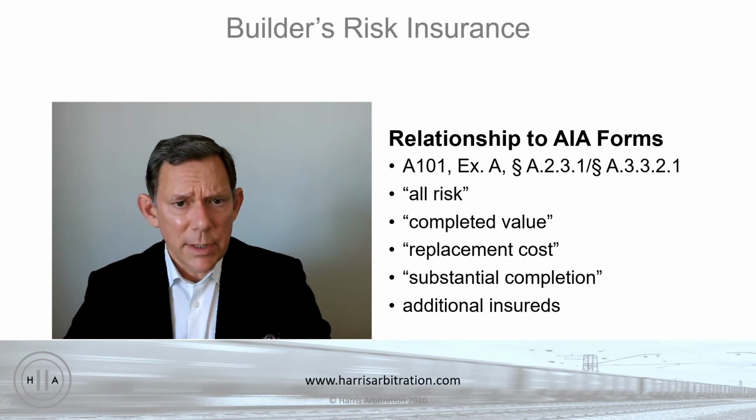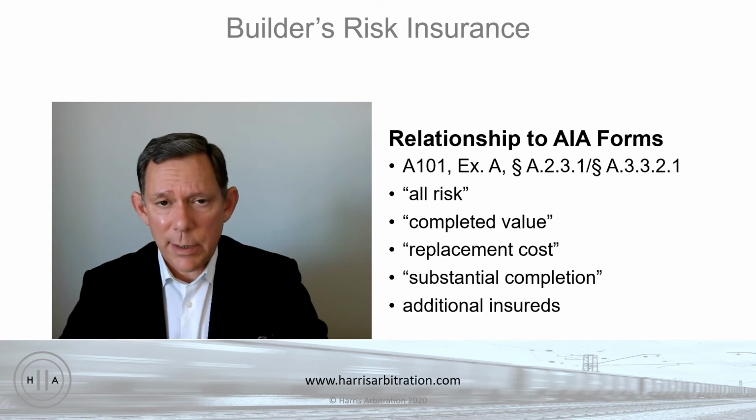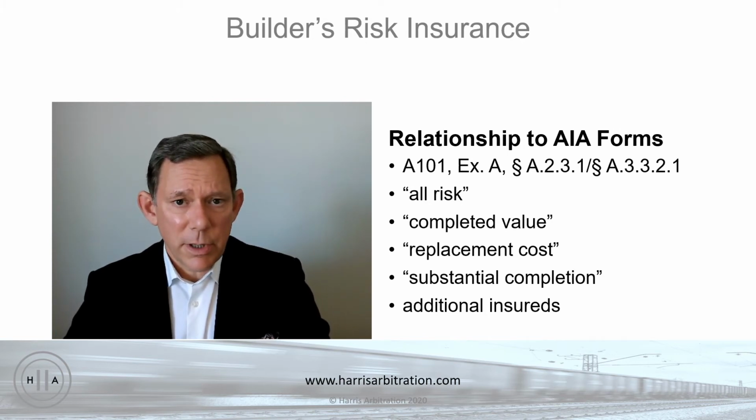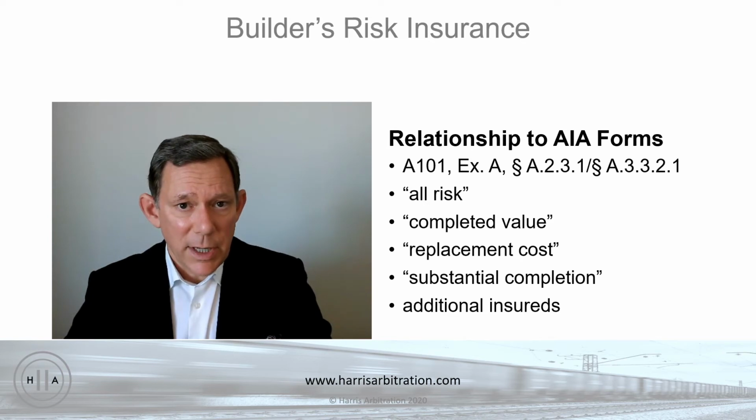Builder's risk insurance generally runs during the course of construction up to the point of substantial completion of the project. At that point, when the project is ready for its intended use, usually a general commercial policy will take over. Now, it's important to make sure that there's no gap in insurance there, because even after substantial completion, bad things can happen, and so it's important that there not be a gap in coverage between the time the builder's risk insurance stops and some new general commercial property insurance takes over.